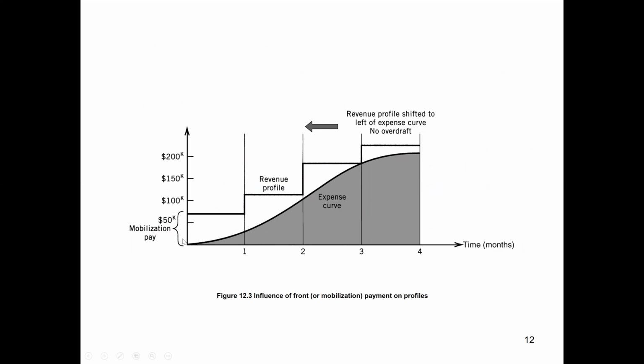They are showing in this case, figure 12.13 shows that the owner trusts the contractor and pays a mobilization advance at time zero to the contractor. So it means they got advance money, mobilization advance money from the owner, and with this money the contractor can build the site office, or can buy material, or they can finance this construction. So it means if the owner pays a mobilization advance, the contractor is always working with the owner's money, and they will be spending this money for building the project.